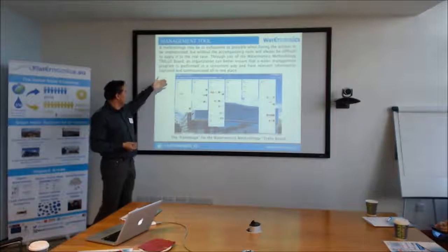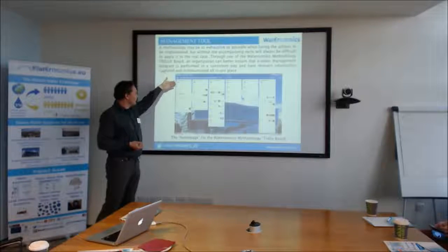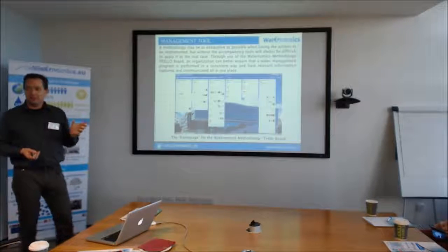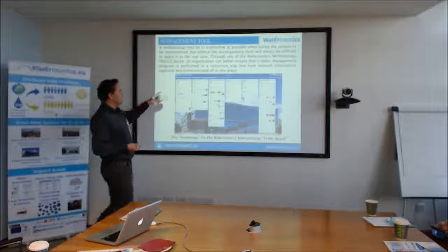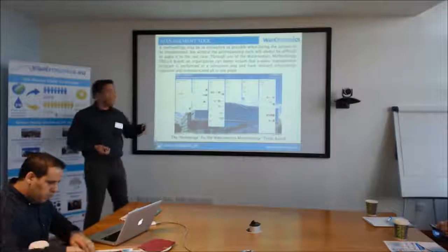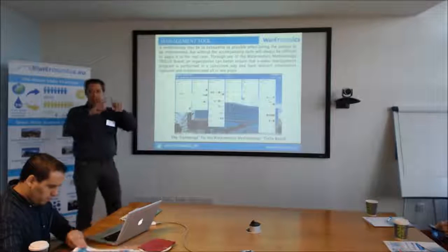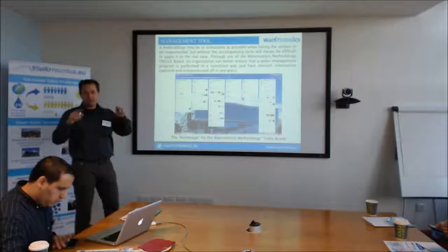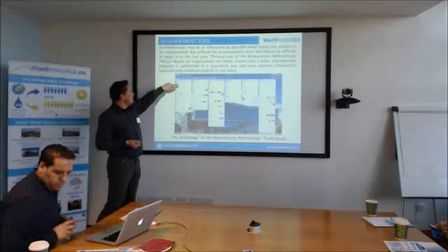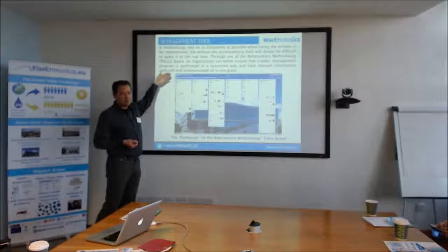And it's nothing more than you can create these cards, and each card contains an activity you can define, and you can assign people to these cards, and people can register to these cards. And instead of these long email threads about certain topics, which I have in many projects, all the communication about a specific activity and deliverables is kept in this card.